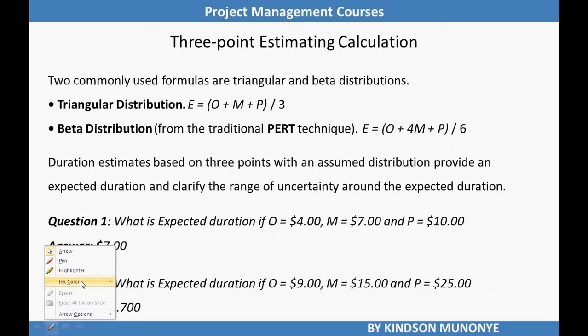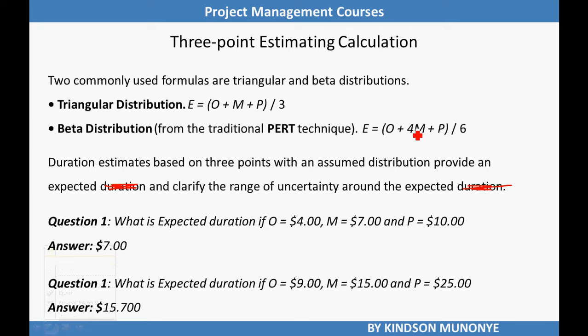Cost estimates based on three-point estimates with an assumed distribution provide an expected cost that clarifies the range of uncertainty around expected costs. Remember, we are discussing estimate costs, not duration. There are some exercises provided: calculate the expected costs using both the triangular and beta distributions. Try to pause the video, pick up a pen and paper and a calculator, and do these two calculations to check if you come up with the same answers.